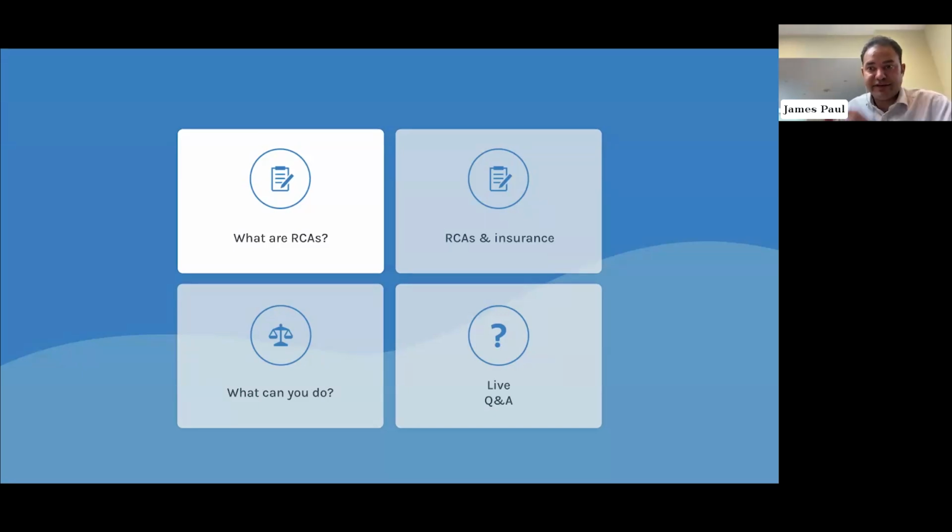And the sorts of things that a surveyor is going to want to see and know before forming their rate in their head or on a spreadsheet, as is more often the case, are a detailed understanding of the exterior of the building, every side of it, the interior, what sort of fit out it has on the inside, all those parts, and maybe the parts of the building that the average resident does not necessarily go into every day. So that might include basement level plant rooms, outbuildings, perhaps even the roof if it's accessible. And then they're going to start doing more of a desktop analysis. They're going to look at plans, building information, any kind of documentation a property manager might have on file already. And they will ask specifics if they have any questions.